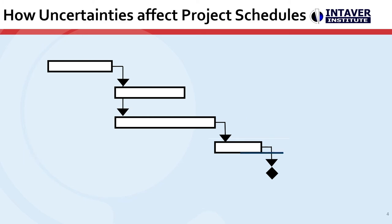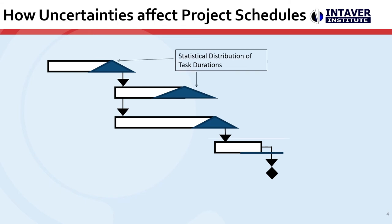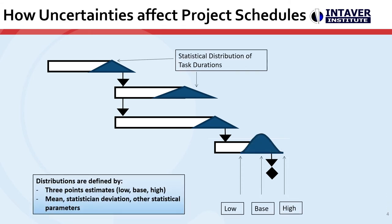Schedules also have uncertainties, which are variances that are not associated with risk events. All activities have uncertainty. This can be caused due to estimate errors, but also due to other factors. Uncertainties are defined by statistical distributions defined by three-point estimates. The most used distribution is triangular, as it is easy to understand and does not require advanced knowledge of statistical methods. A fully risk-adjusted schedule can have both risk events and uncertainties.